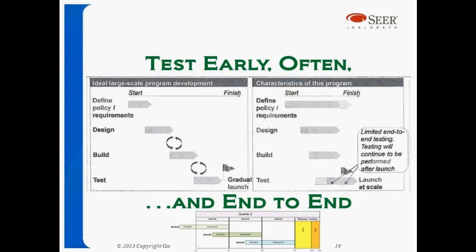Another problem that emerged on the project was testing, end-to-end testing in particular. This chart was also taken from documents that were submitted to congressional testimony showing the process that was followed. It shows basically a waterfall process with some iterations, but that was the plan. It actually ended up being much more monolithic, where testing was bunched toward the end.